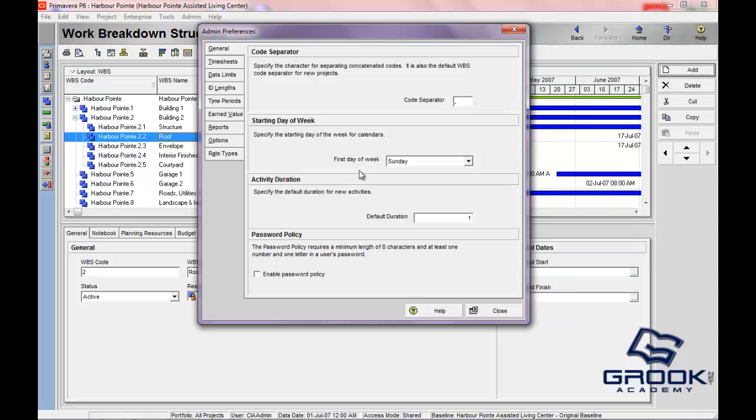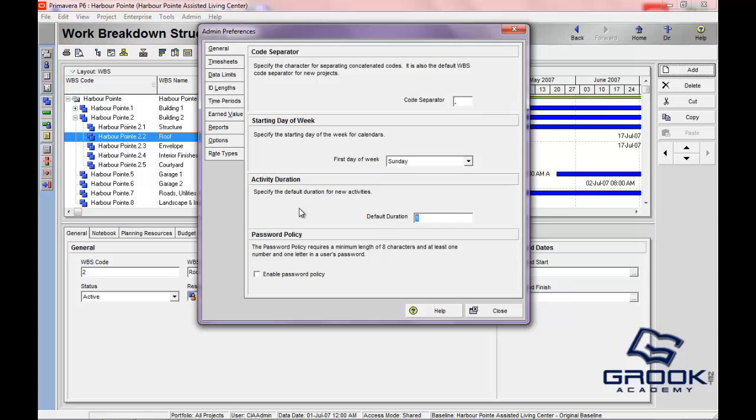You'll also set the starting day of the week. If your company is a construction company and their fiscal week is Saturday to Friday, or Monday to Sunday, you'll be able to set the first day of your week here. The activity duration default, when you create a new activity, it will currently be one day just by default.